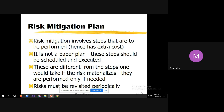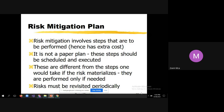Risk mitigation involves steps that have extra cost — mitigation plans always come with added cost. It is not a paper plan; these steps should be scheduled and executed. The overall idea of mitigation is to reduce the impact of a particular risk. These steps are different from what one would take if the risk materializes — they are performed only if needed. Risks must be revisited periodically.